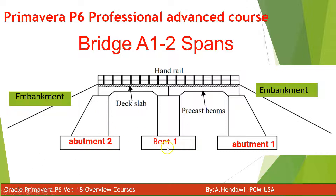This lecture is going to be about doing relationships — meaning the sequence of work. Normally you do constructability review and sit with the project manager and superintendents to go through the sequence of work. For this easy case, you do excavation for abutment, then the column, the same for bent excavation, the footing, new column, abutment two, and then the precast beam, slab, handrail, and embankment.